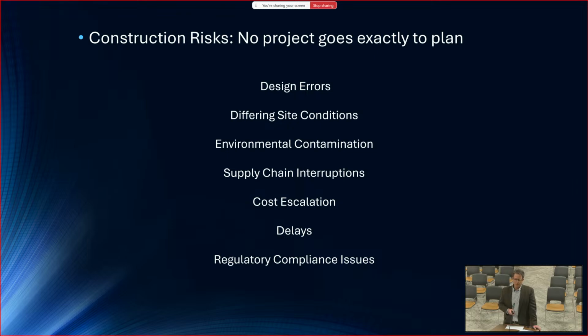And the pushback was, we can talk about that, but if I'm going to assume the risk for an unknown condition, I'm not going to find everything unless you pay me $10 million to do the site investigation, and I'll punch a hole every foot over the entire site. And it was a complicated site. It had been there for many, many decades. There was stuff under the ground that they expected they wouldn't know about. Records were incomplete from that age and so forth.